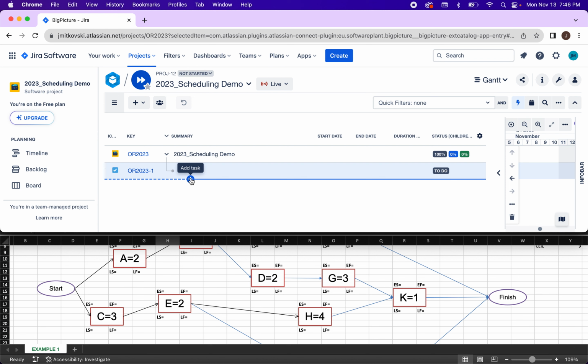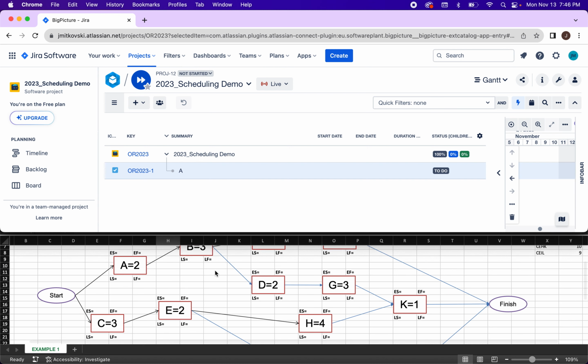We are going to then sequence those activities, or, and again, the order here is not essential. We can estimate the activity durations and then do the sequencing, but ultimately those are the elements that we need to consider to be able to model this network diagram below.